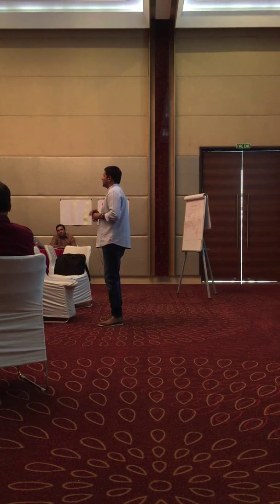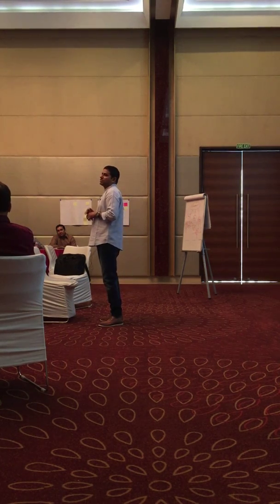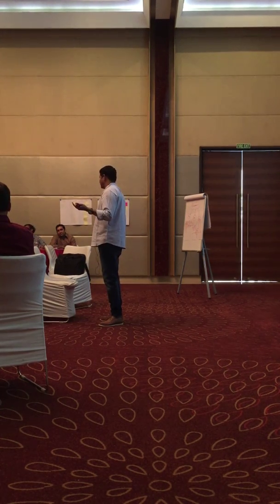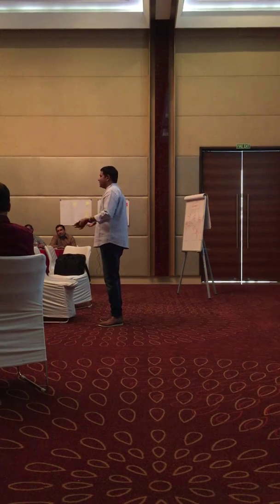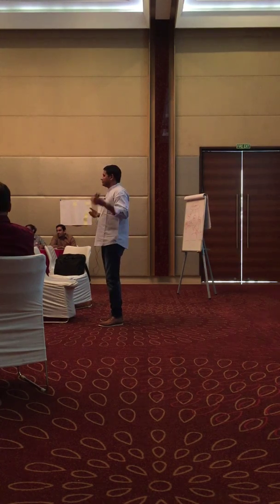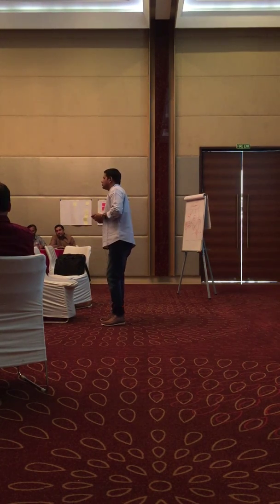Generally, Scrum does not allow changing the sprint backlog once the sprint begins. At times it is okay. If you make it habituated, the product owner with the day 3, day 7 becomes okay, remove it, add it. So again, this will break the principle of collaboration. Right? So collaboration again.